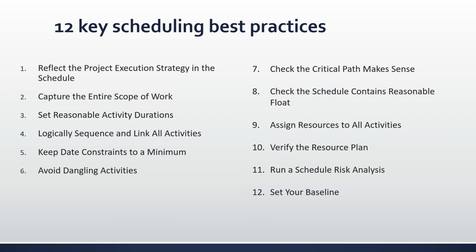And lastly, number 12, set your baseline. The project baseline is a defined benchmark for evaluating your project performance. You should set the baseline after the schedule has been challenged and verified, but before any work starts on the project and progress starts to be reported.